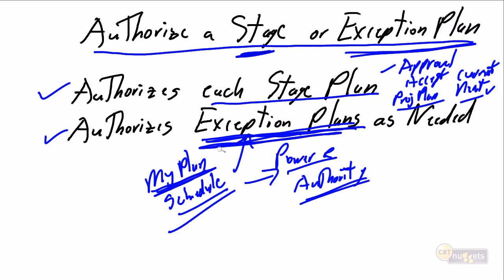So again, this is where that concept of exception plans comes into place. We've exceeded our tolerance, but we're still continuing to be in charge. We're simply bringing in the wise, seasoned experts from our management team, from directing our project, to help us vet, to improve our plan, to make it their plan, and then they're going to proceed and approve it.